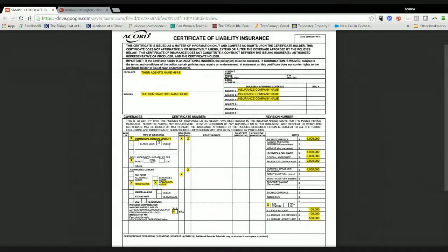Number 3, the thing to look at is additional insured. Make sure that you are named as an additional insured under their policy. The thing about this is that if you have a certificate of insurance and they do something to get you sued, let's say they're an electrician, and they accidentally wired the house wrong and the house burns down and kills 3 people. If they give you a certificate, but this is not checked, the only thing that is happening is that they have coverage. It's not doing you a lick of good. Okay. It may help reduce the damages that you get sued for, but it's not going to protect you. It's not going to do anything.